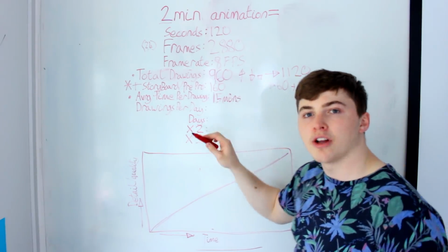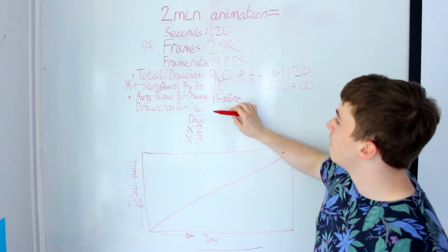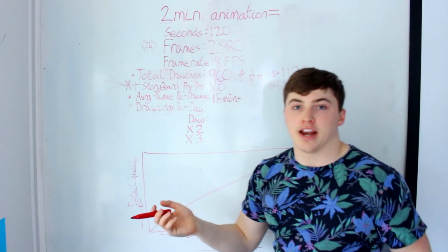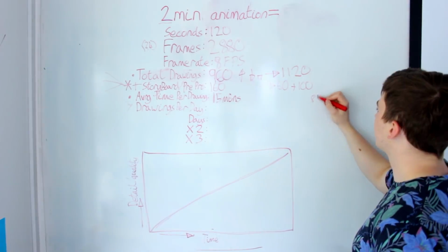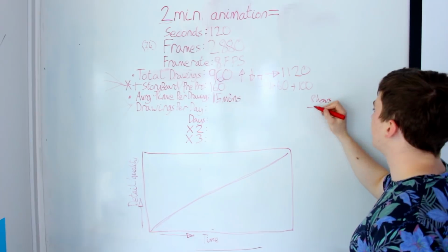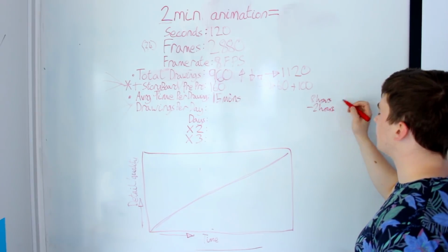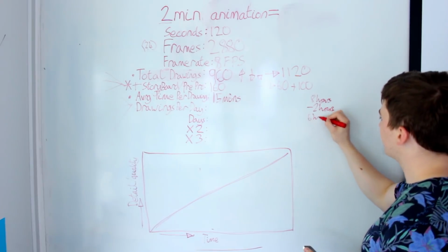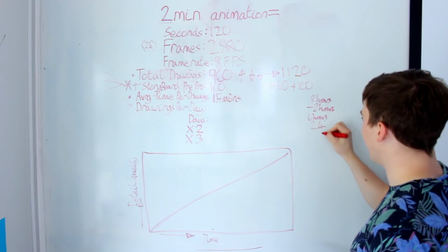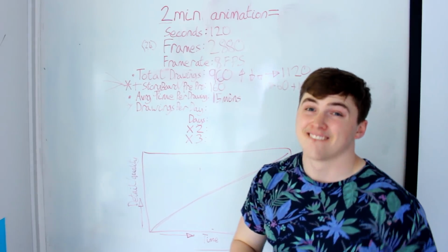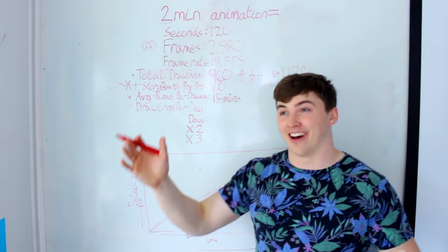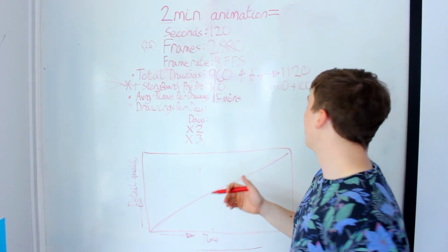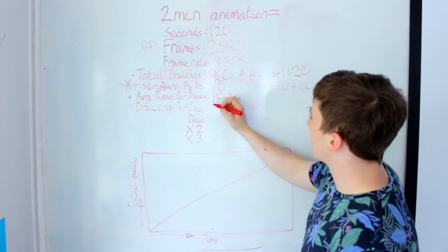If you sit down per day, and this is an average, how many drawings can you get through per day? Let's say you're working 8-hour days. 8 hours minus 2 hours for contingency time, lunchtime and things like that. So you've got 6 hours. So let's say you can get an average of 24 drawings per day. Now that I say that out loud, 24 drawings per day, that actually sounds like a lot. That sounds like an awful lot. But we'll put it down, okay?